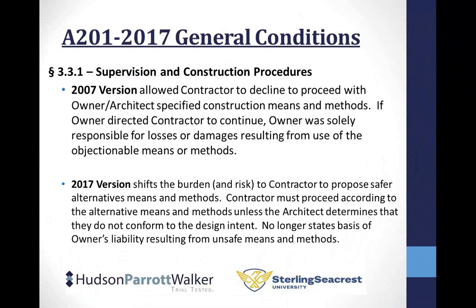Correct. You've raised an entire different seminar that I give on the dangers of performance-based specifications deriving out of what often we see in EPC contracts, engineer, procure, construct, but performance-based. The only thing I could tell you in this short period of time about performance is it is an extraordinarily dangerous activity. It can essentially make you responsible for not only the design of the building, but essentially the machine functionality of the building, and it needs to be heavily negotiated and dealt with. If it's not, you have a risk that is profound. And curtain walls is an obvious example because curtain walls is like retaining walls. I mean, it's not uncommon that a curtain wall is a design build within, okay?